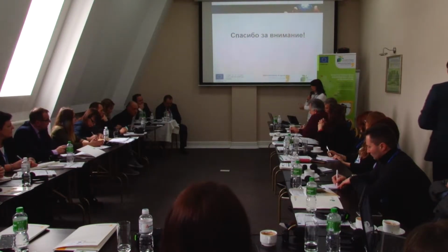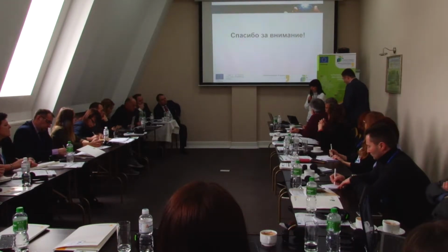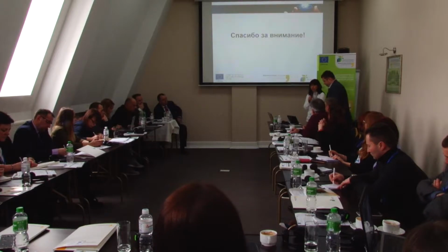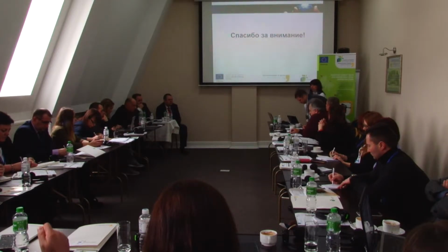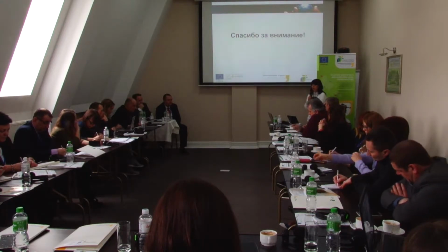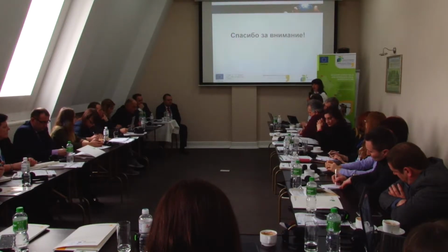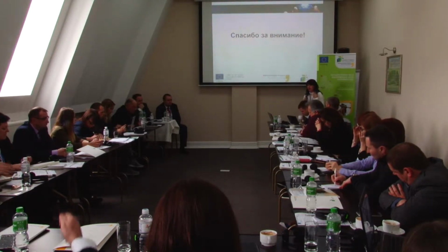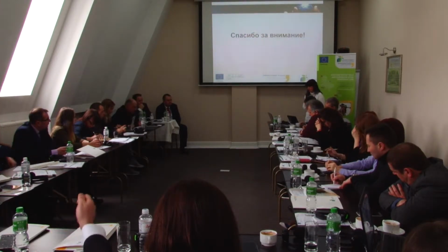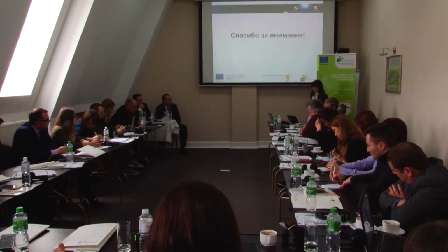They will have to calculate costs that Maxim has mentioned, costs of facility operation, and in their technical design documents, they also need to take into account the use of new equipment that will be installed in your building. They will have to provide you the calculation of the degree of complexity of the facility undergoing examination.